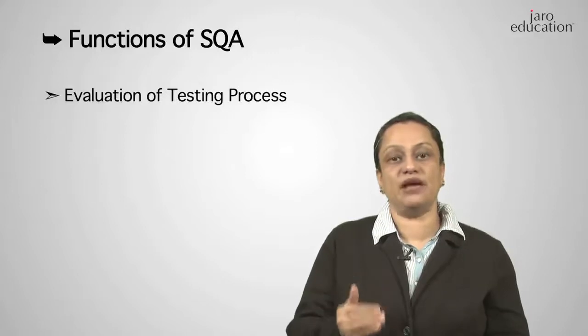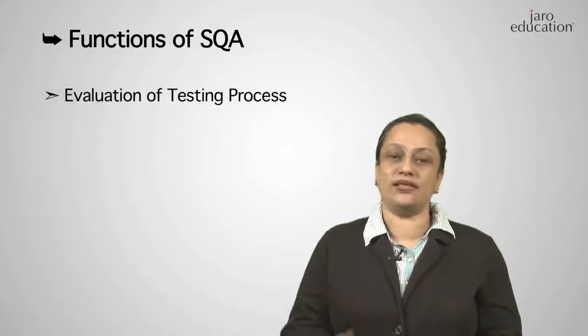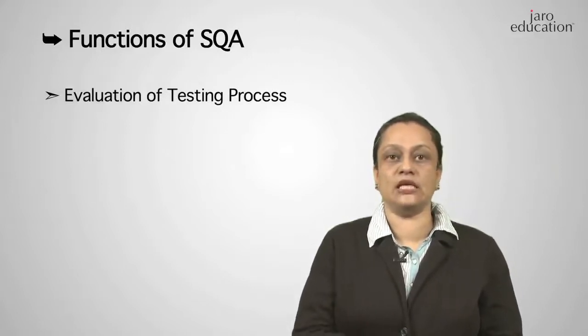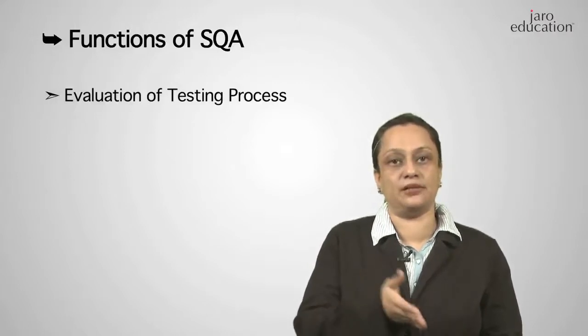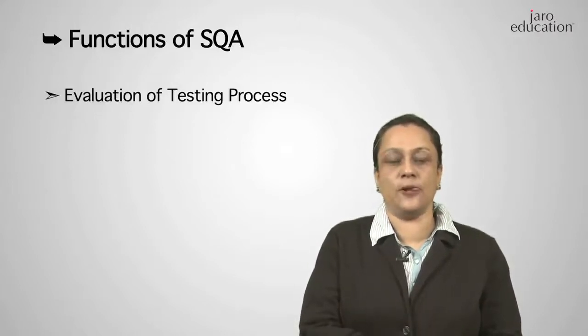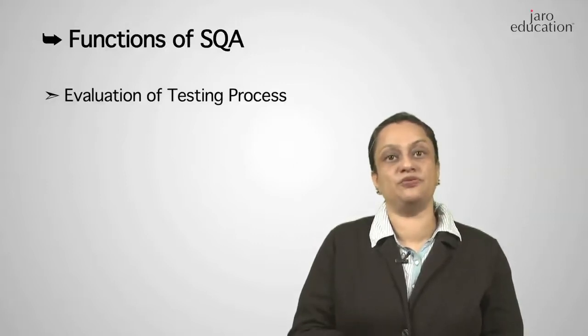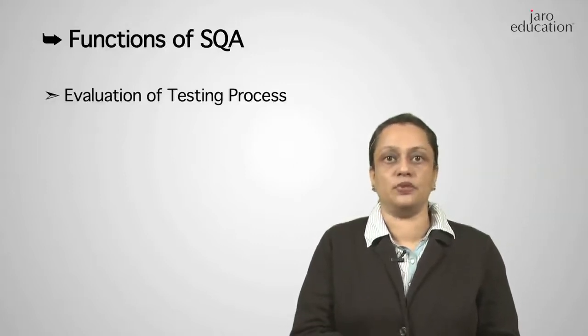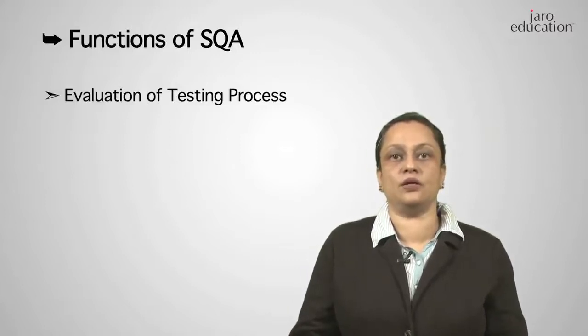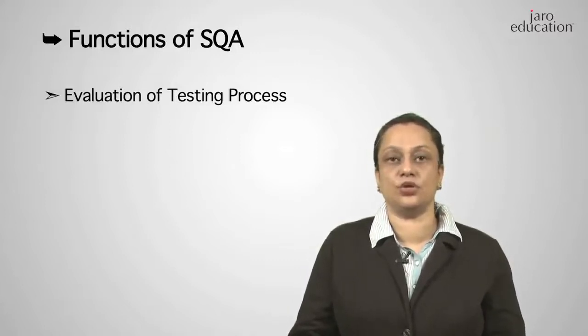The SQA also evaluates the testing process, whether there is an independent group doing the testing, whether the test plans have been prepared early in the life cycle of the project. Ideally, the test plans should be developed during the requirement phase itself, because you know the requirements. So, defining or listing the test cases should not be an issue.